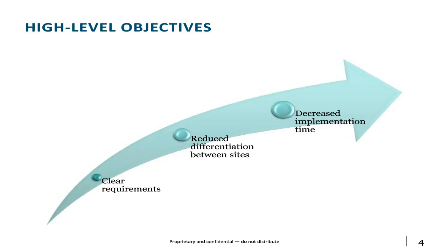We also have a decreased implementation time for the reasons I mentioned a few minutes ago. If we constrain our deployment to those things that bring business benefits, we're not implementing functions that are only used 5% of the time. At least we're not doing that in the first phase. So when we go about expending our precious project budget and developing a system, we're really aiming at those things that bring the greatest business benefits, so we execute those first. That allows us to expedite the project implementation time.